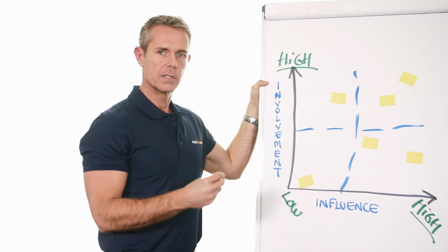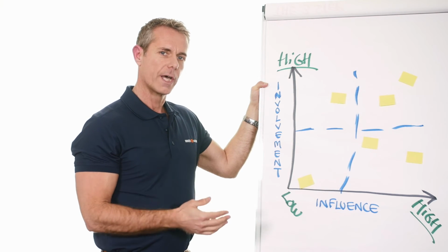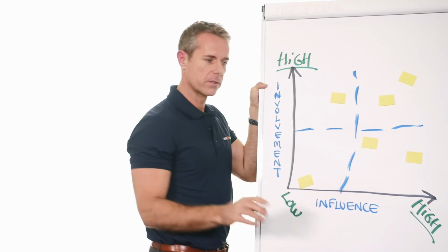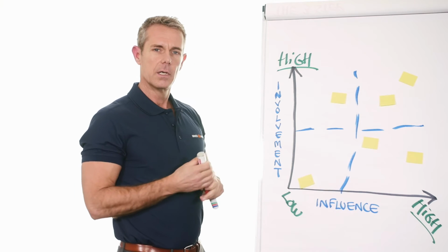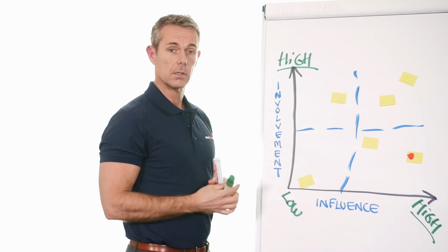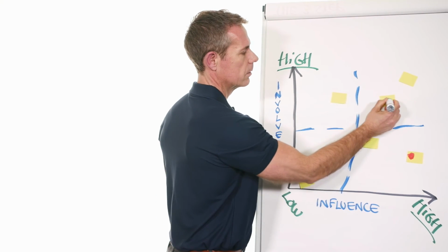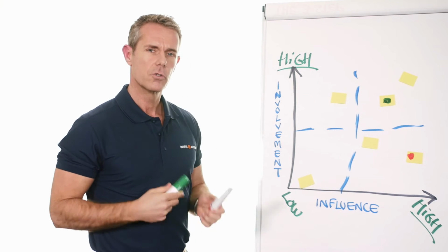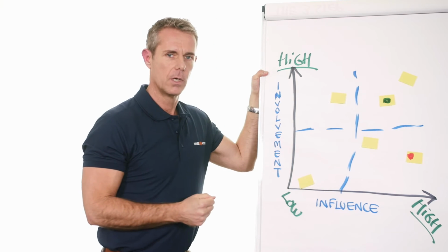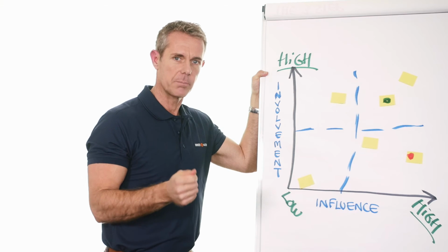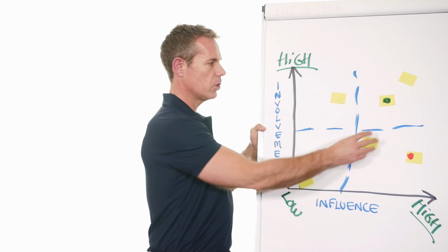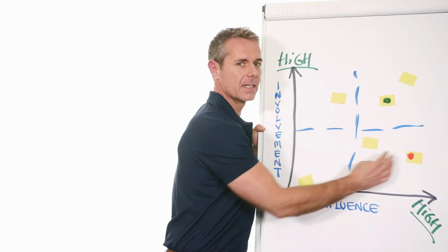But more importantly, before you start developing your communication plan, you should consider whether each of these stakeholders, especially the influential ones, are positive or negative. So together with your team, you should actually take the time to identify and even mark negative and positive stakeholders in your surroundings. So why is this important? Well, the difference between a positive and negative is of course the way you're communicating with them. But most importantly, and that's something experienced project managers know, if you have an influential stakeholder that is negative, sometimes you can actually use the positive stakeholder to influence the negative stakeholder.